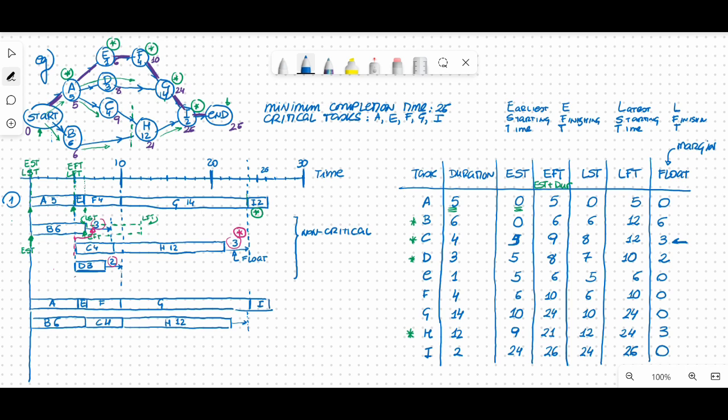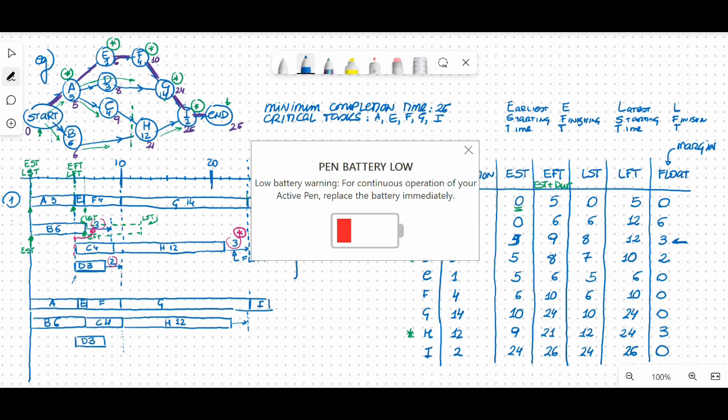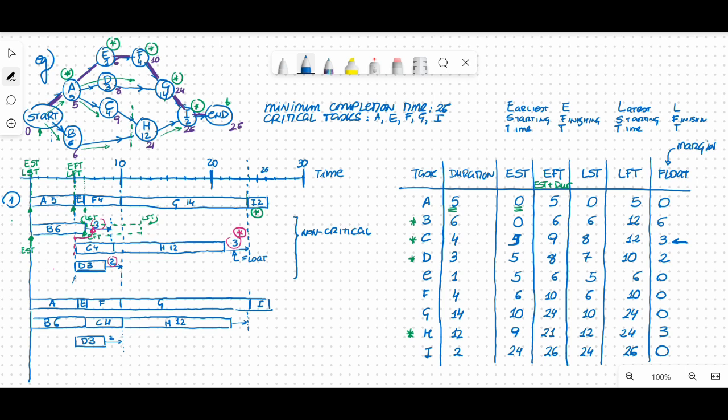Well, will I be able to place this one anywhere else? No, I'm just going to put it in here. I want to start it as soon as I can. That way, if there's any mishaps, I still will be able to absorb them. Well, this was the first person. That means that I have to have a second person here and a third person there. Multitasking, so by 26 units in here, the whole project is finished.